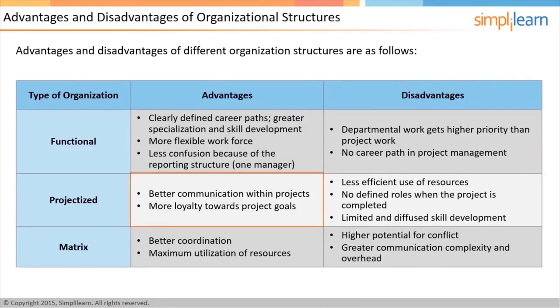In the case of the projectized organization, one of the clear advantages is better communication within the projects. Since project work is the only work team members are doing, it also leads to loyalty towards the project goals. The disadvantage of such organization type is the inefficient use of resources, because every project team has their own support function.